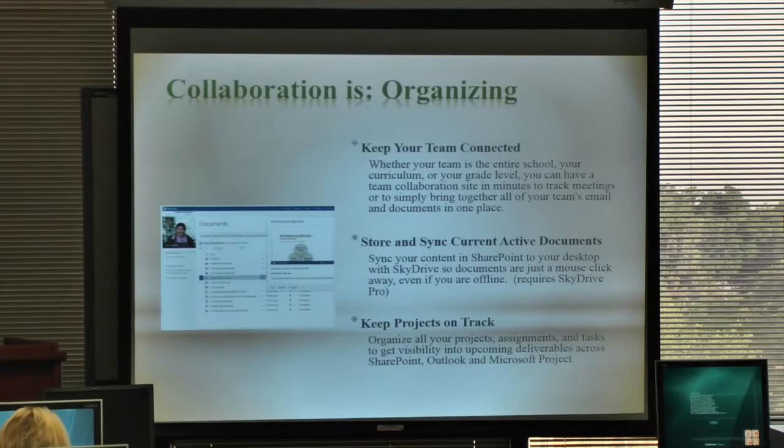And you'll be able to keep track of projects. This is sort of a hidden feature that a lot of people don't use. There's actually a type of list inside SharePoint called a task list. If you create a task list specifically for a project and then create individual tasks for each thing that has to get done, assign those tasks to people. As soon as you assign the task, that person gets a notification automatically by email. They can go in and update the task in terms of percent complete, what things they're working on, or what problems they may have at any given task level.